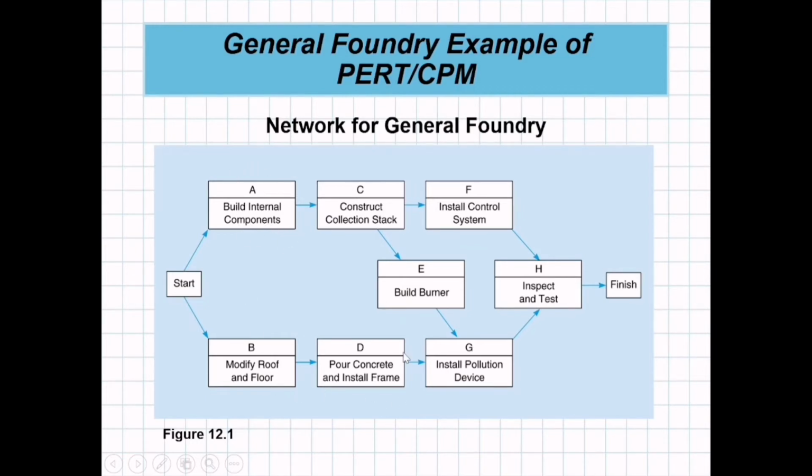The same with activity D, you cannot pour concrete and install frame if you are not done yet with modifying roof and floor, which is activity B, because activity B is the predecessor activity of activity D.